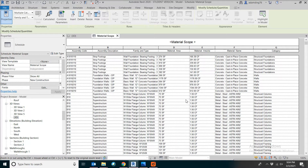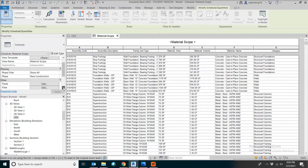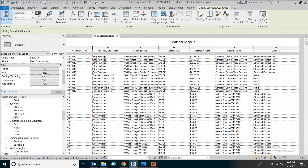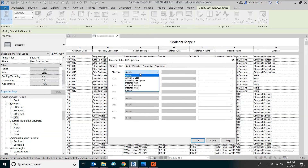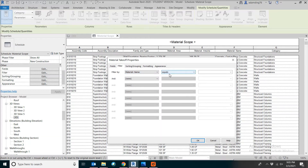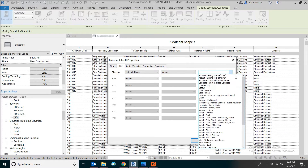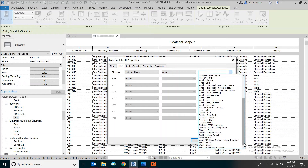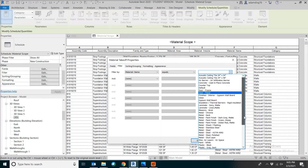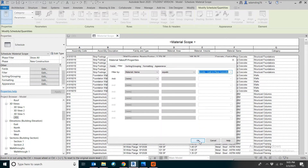This is also the general idea of doing BIM estimating. Find the property window for the schedule, then go down and find the filter. Click on that. You can pick a material name. By default it will be set to equals. Now you can pick the material you need — for example, let's say we want concrete. Click OK.